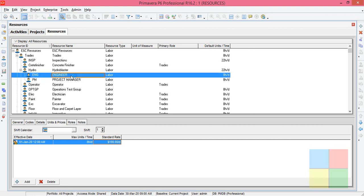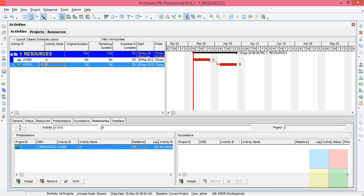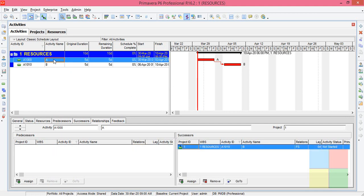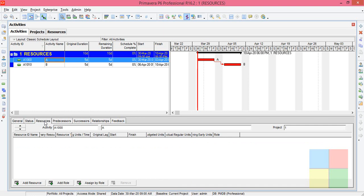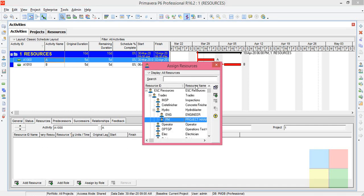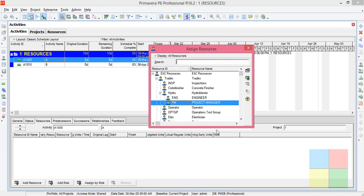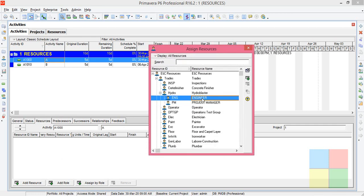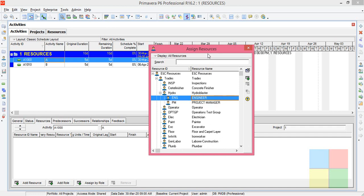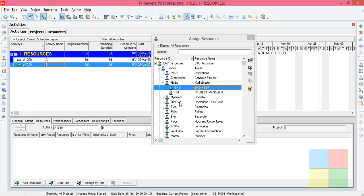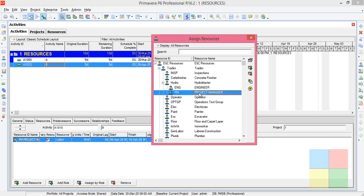Now let's come to the activities window. Now what we have to do is click on the activity, then come to the resources, click on add resource. You'll see a dialog box in which you can see the available resources. It's here which we added just before five minutes. Engineer is there, project manager is here. For the first activity I'll go with engineer. For the second activity I'll go with the project manager.